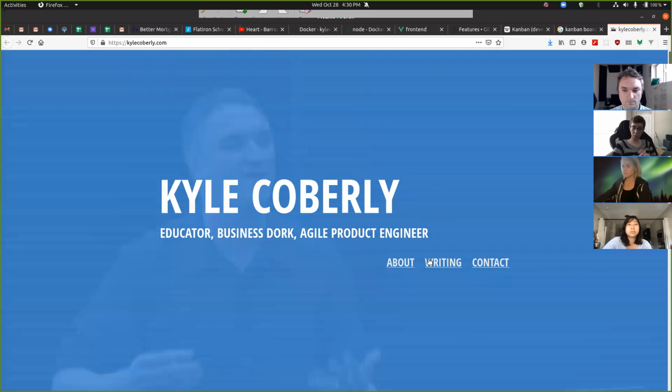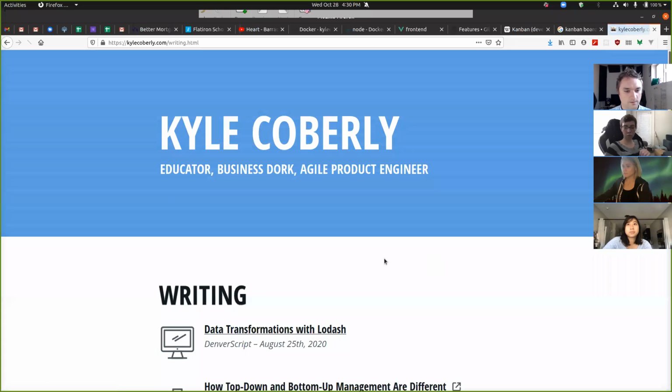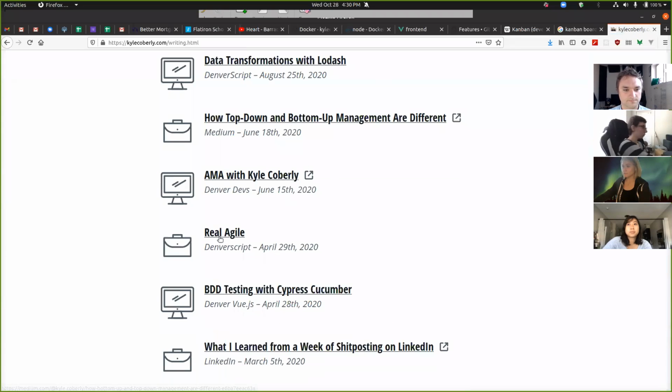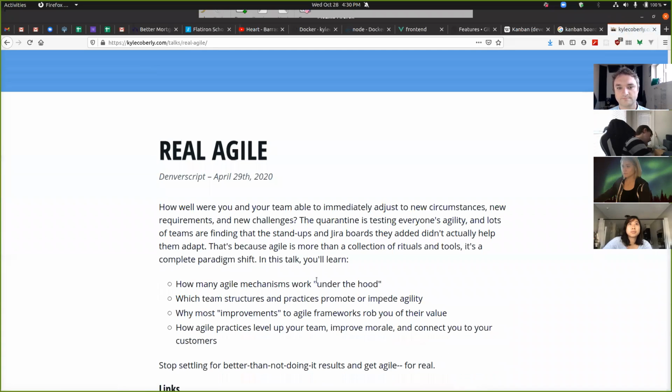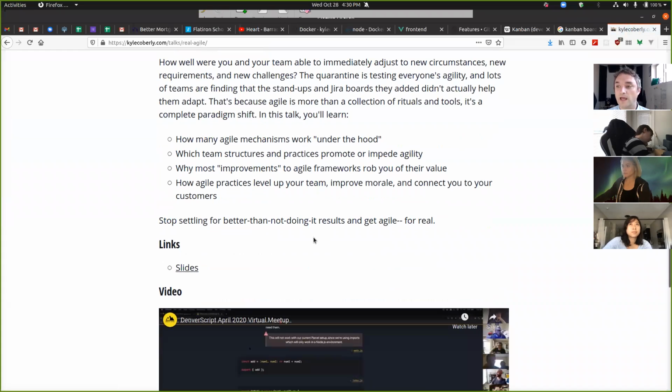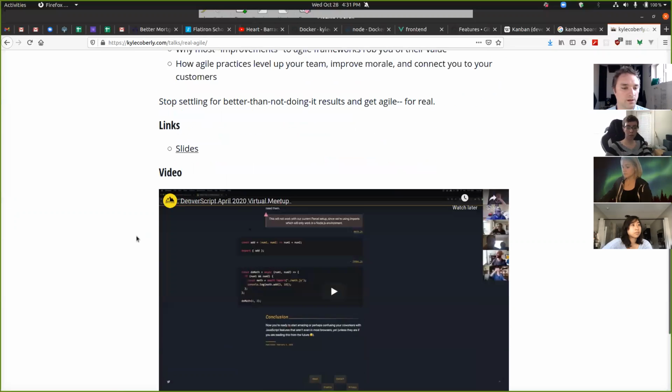Would a decent analogy be that that graph reminds me of how the students move through this program, from one column to the next? Yep. We would be Kanbaning if you move on to the next mod when there's capacity for you. It's like, sorry, we only do 10 students in mod 3. So as soon as one of them moves to mod 4, we can move a mod 2 student into mod 3. If we were resource constrained in how many students we could teach at once, that might be a thing that we did.